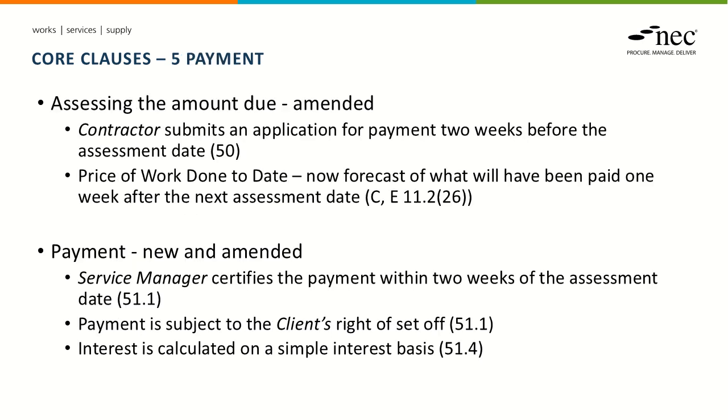In terms of payment, a couple of changes have been made here. In terms of timing of when a payment application is submitted, it now needs to be submitted 2 weeks before the assessment date to give the service manager more time to process it. And what we're assessing has also been changed in terms of forecasting what will have been paid 1 week after the next assessment date rather than by the next assessment date.